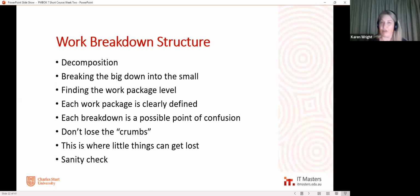It really does depend on the project and what you're trying to achieve. I do agree that functional structures can create silos, because people are working on the project in the business and they're in their own little area of the organisation, and a lot of projects like that don't get traction outside that area because nobody knows about it. Everyone who's working on the project is working in their functional area and they're all just talking amongst themselves about the project. And that can be kind of unfortunate. Whereas the matrix structure does enable some cross-pollination in the organisation, so that people are more aware of the project and know what's going on.